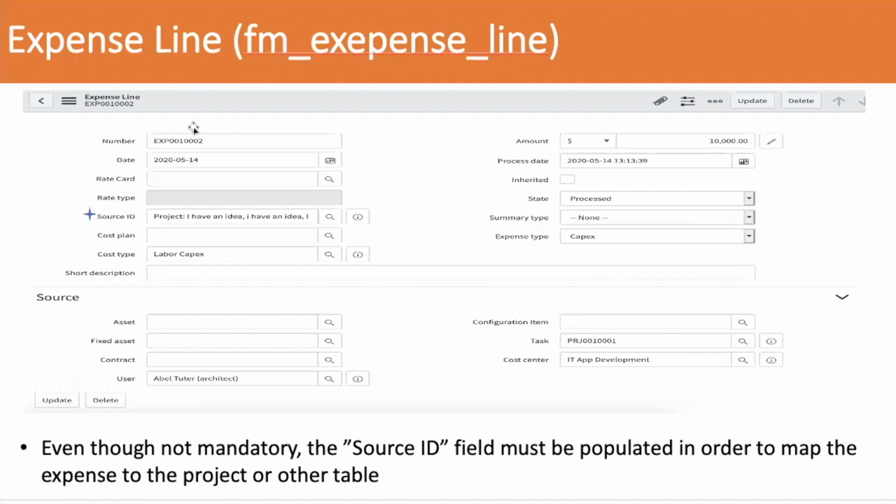Here, also, if your project manager wants to do expense lines, say an expense came in for my project and I have to track it, you can see that this does not look anything like the project form. So this is new functionality that you need to teach your PM, if that's what they want to do to manage their actual project. It's a different form and it goes out to different places in the system. It doesn't just stay with that particular project. There's the expense line table that's going to house every one of your expense lines, and there are cost models that use expense lines. So understanding that it branches out further from this is key.